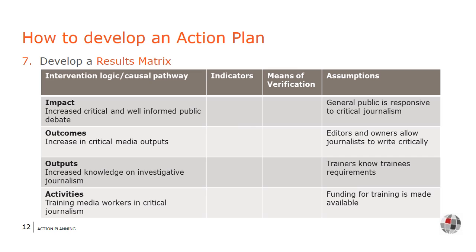There are two common characteristics of both risks and assumptions. First, there must be some uncertainty to the event. If there is a 100% chance of an event occurring, it is simply a fact. If there is a zero chance of the event occurring, then it's pure fiction.